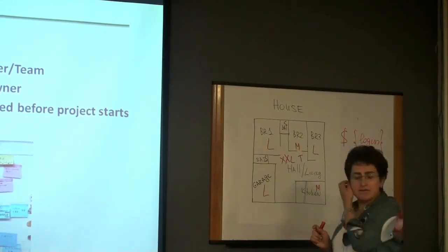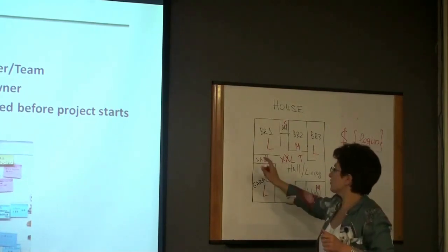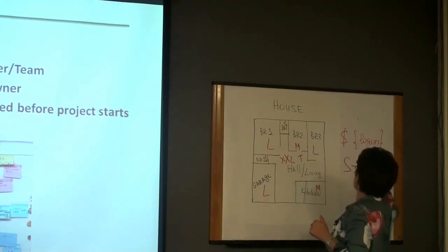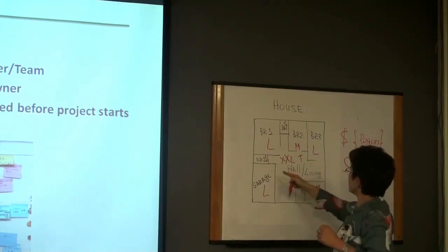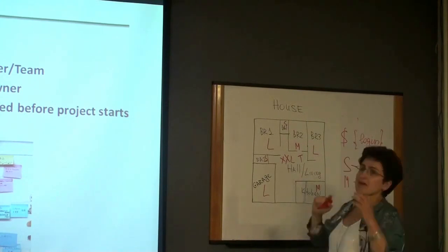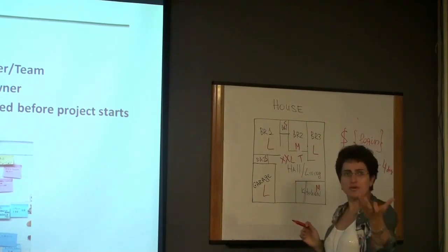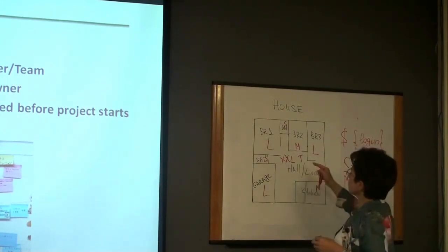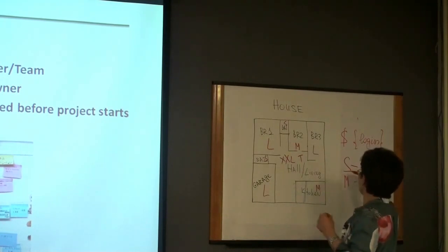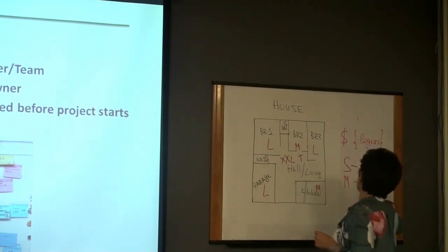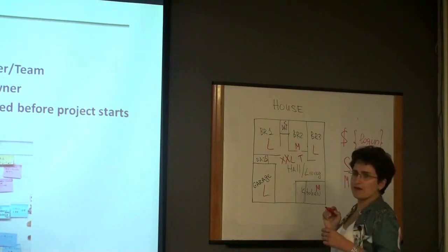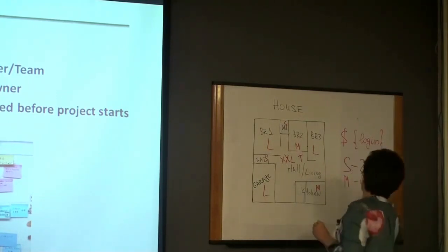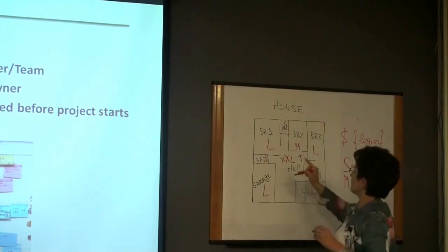And collectively they come with the estimate that, for example, the small feature will take us 2 days. And then, how many small features do we have? Again, collectively, development and QA look at the feature. They try to better understand the effort. And for example, for the medium, we've looked at it and we said, yeah, it will be 4 days. How many medium features do we have? 2, right? Which means overall effort is how much? 8 days. Okay. And then the large items, right?